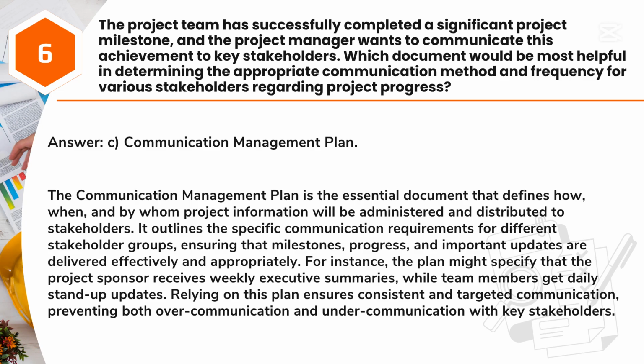For instance, the plan might specify that the project sponsor receives weekly executive summaries, while team members get daily stand-up updates. Relying on this plan ensures consistent and targeted communication, preventing both over-communication and under-communication with key stakeholders.